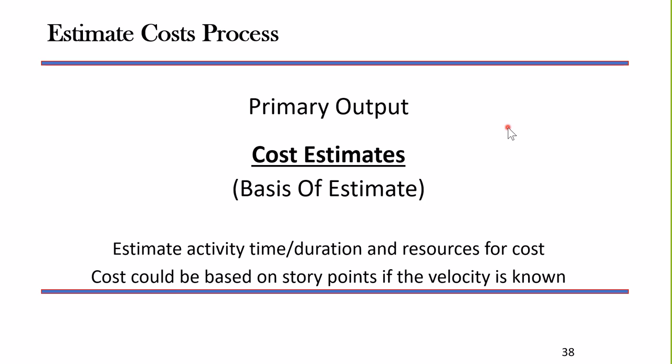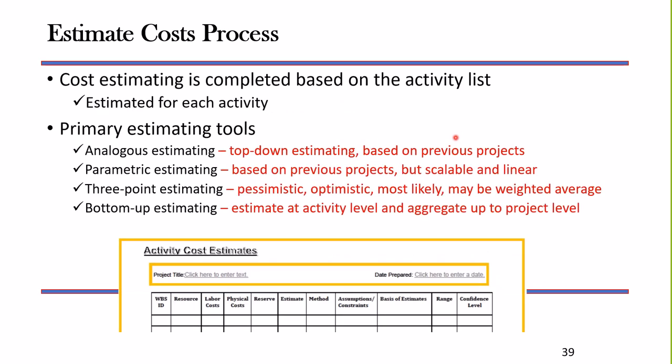What I have to do here is understand the cost so I can know when I'll be paying for those costs. I will tie my cost baseline, which is coming up, to my schedule so I know exactly when I will be paying for my activities in the project.